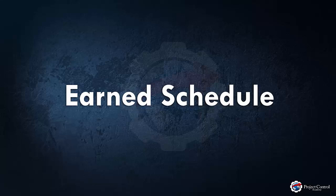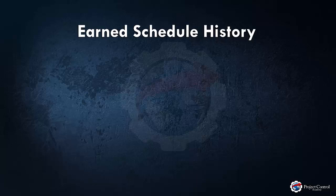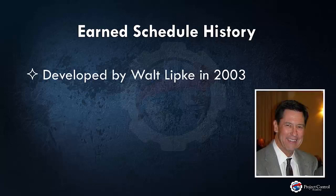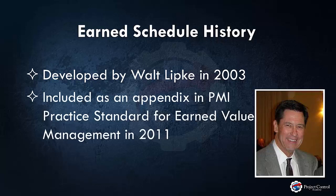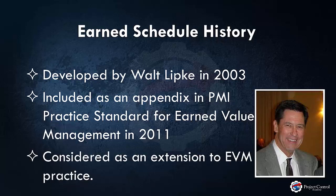Let me give you a bit of history about earned schedule so you better understand what it is and where it's coming from. Earned schedule is a fairly new concept that was initiated by Walt Lipke back in 2003. The good news is that earned schedule is now included as an appendix in the PMI Practice Standard for Earned Value Management, and it is considered an extension to EVM practice — released in 2011. So the age of earned schedule is not more than a decade from its initial conception. Although it has been adopted globally, this method remains unknown to many EVM practitioners.